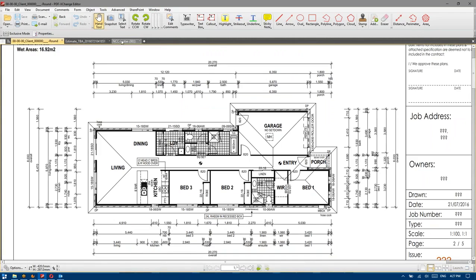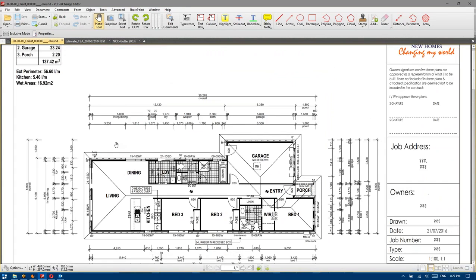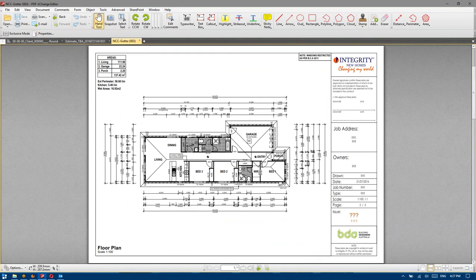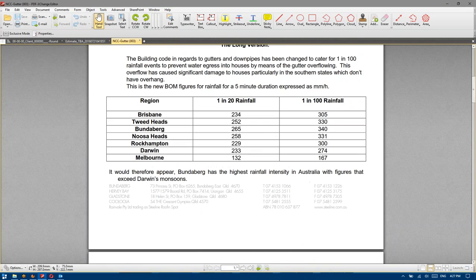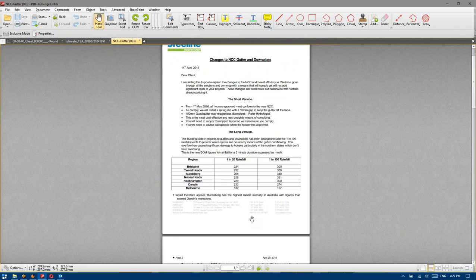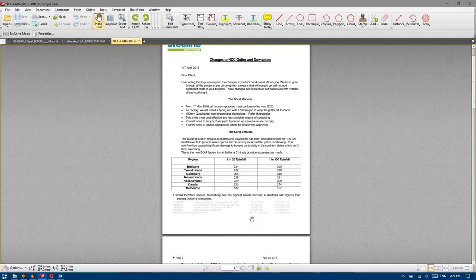Maybe it's going to be a bigger issue in Queensland where they've got greater anticipated rainfall events. As you can see, there's some pretty reasonable rain levels here in these markets. Historically, a few years ago Dan and the likes ran all these calculations on the rainfall information they had on hand and said they'd work off 30 to 40 square metres of roof area and downpipes at a maximum of 12 metres.